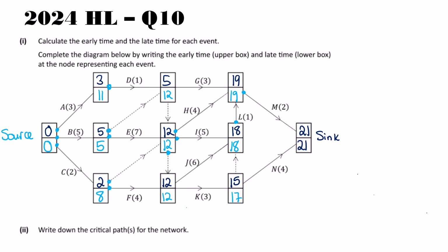So take your time, be careful, don't be afraid to change it up, maybe use different colors, and literally, like I've done, dot where the activities are coming in and out of the nodes, so it's very, very clear. Now we're going to look at some critical activities. Now, critical activities will only occur where the node has the same early and late time, but it doesn't mean it's definitely